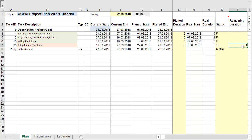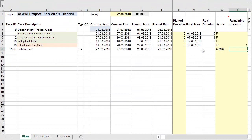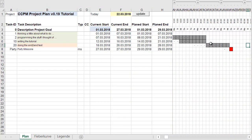Day by day the end-to-end test progresses. Every day you update, the Excel records progress and buffer consumption. Since the fever curve zigzags daily, the Excel plots one dot per week using the last value of each week. By around the 22nd–26th, if things proceed at this pace, the end-to-end test should be nearly finished.